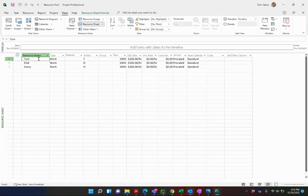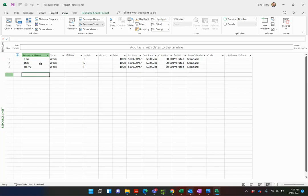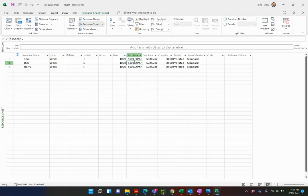So I'm not going to do any tasks, nothing in here, no start date, nothing. All I'm going to have is my resources: Tom, Dick and Harry. Give them a standard rate, put their calendars in, etc.